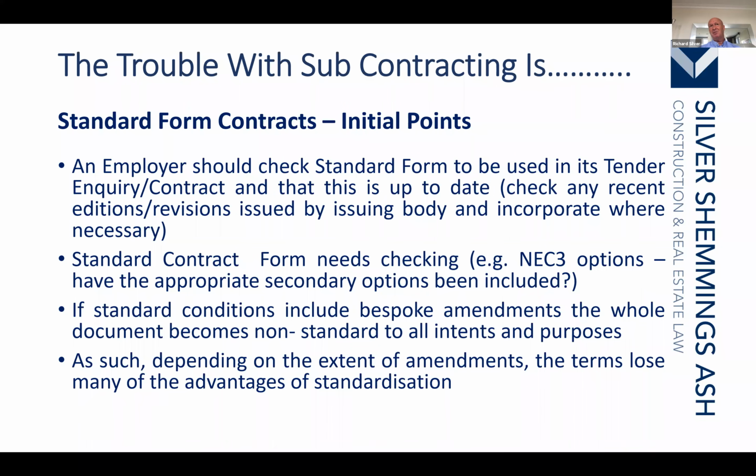So the incorporation by reference of certain standard forms is problematic. Just dealing with incorporation, what you have when placing a subcontract is you have two things. You have either all the documents which the parties have signed, and you can point to them and you say that is the subcontract documents, or you can have a simple page which then lists out all the documents. And although you haven't signed those documents, by signing this one page, all those other documents are incorporated into the contract by reference.